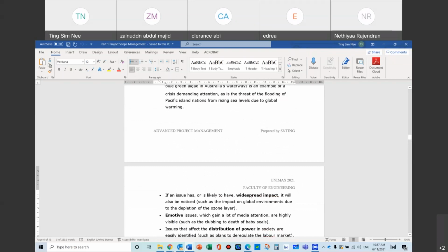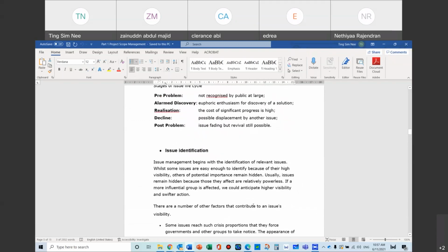So those are some ideas about where your issues may come from, you see. Sometimes it can be something very unexpected, from heritage or culture. If you think about these issues in the beginning, they will not create a problem for the project later. Just very simple: I'm a civil engineer. I see a lot of projects dealing with native land where the project is delayed because of land issues.